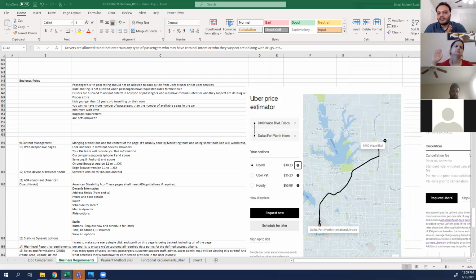How? Just a second, Samit. So when I wrote my name one time, then Samit wrote it, then Shrey, and then Revant. After Revant writes his name, its product is going into the market. So as opposed to delivering one product with 10 functionalities, you delivered one functionality every month or every week. In Waterfall, you would have delivered 10 capabilities at the end of 12 months. In Agile, you delivered one capability every week or every 2 weeks. So that's the major difference, right?